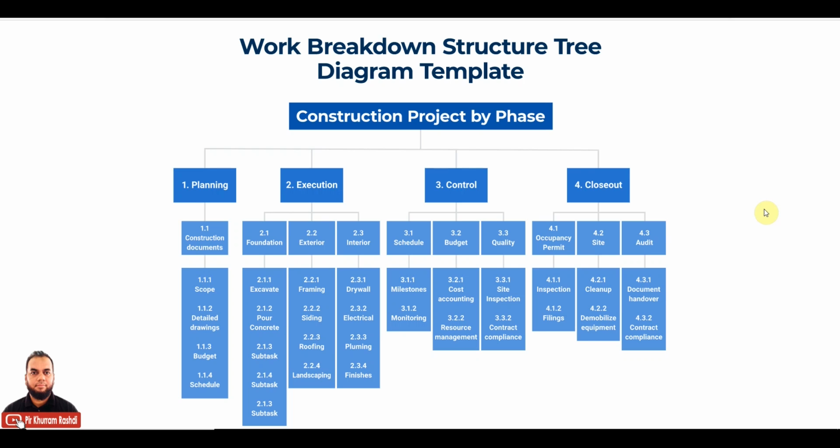But the work breakdown structure also includes, apart from the composition of work, the size of work, and also the cost of the work. Cost means maybe the per hour rate of manpower or professionals, and each component or task also includes its duration. So duration in hours, of course. So the size, the cost, and the duration of each component or task will be included. Size means the amount of work required.